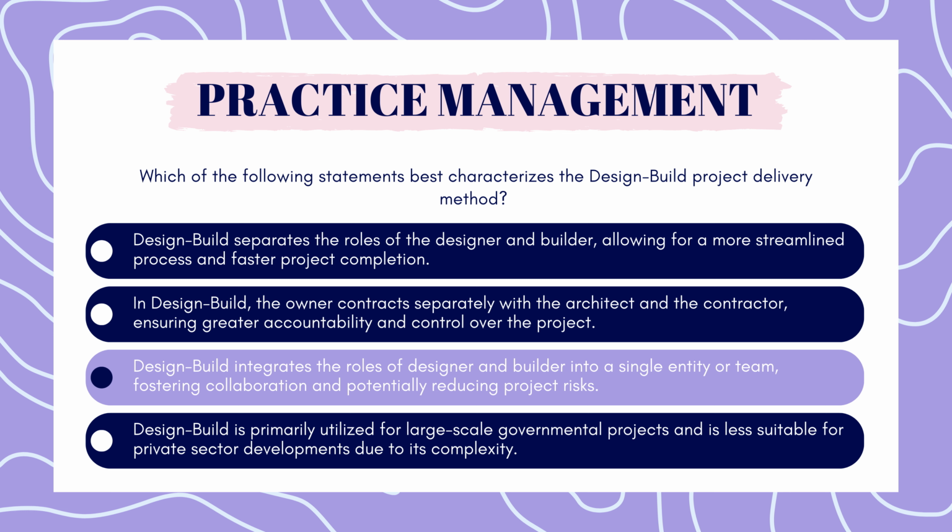Design-build literally describes the team, a designer and a builder, and design-bid-build literally describes the process. Someone designs it, the project gets bid on, and then the contractor builds it. So don't mix these up like I did, even though they sound similar. Also, a tip for you. If you get a question on any of the exams, not just practice management, and they don't tell you what the delivery method is, then it's the traditional design-bid-build method.